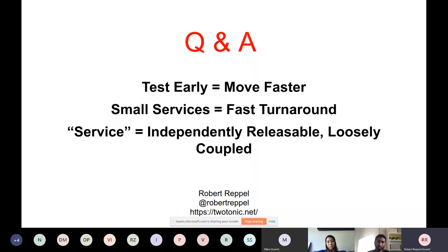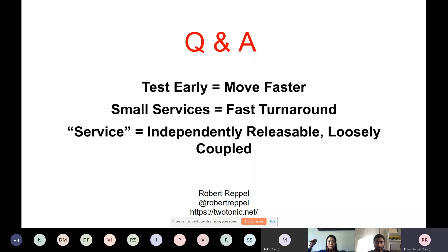In a nutshell: test early so the earlier you test and find things, the faster your cycle times. Smaller services lead to a faster turnaround. The key definition from a project management and cycle time perspective: a service is independently releasable and loosely coupled. Loosely coupled means you can turn it off and the entire system won't go down, or if everything else is turned off it can still operate independently — the data may be stale, but it's still working.